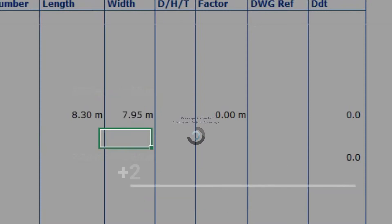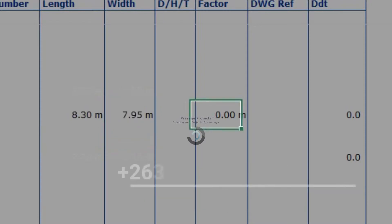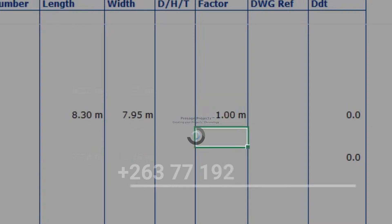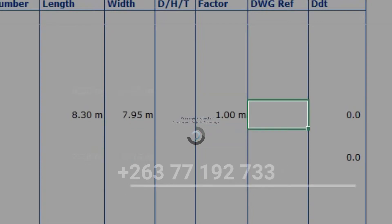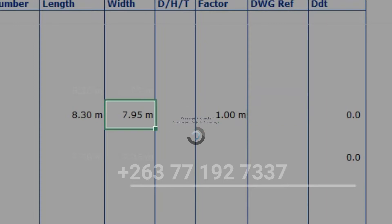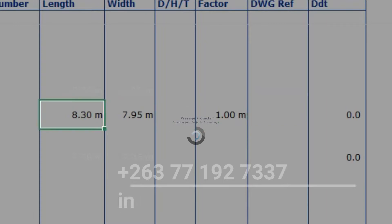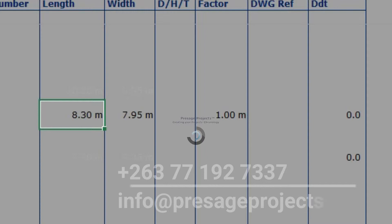I'll clear the site 1,000 millimeters around the building walls and I have no deductions. In my pricing module I automatically get various information — the clear site area, the removal of turf, and elevation of topsoil.